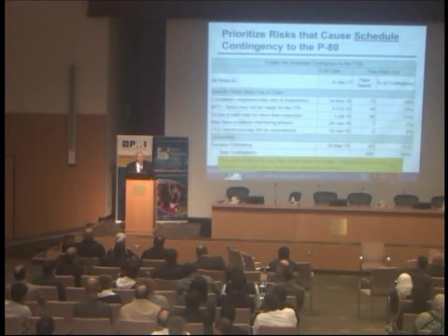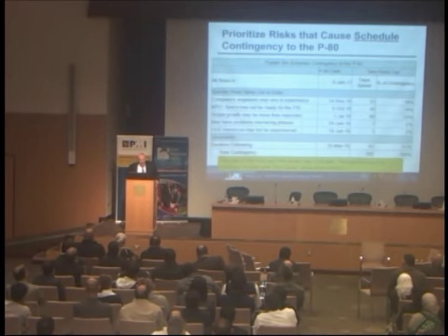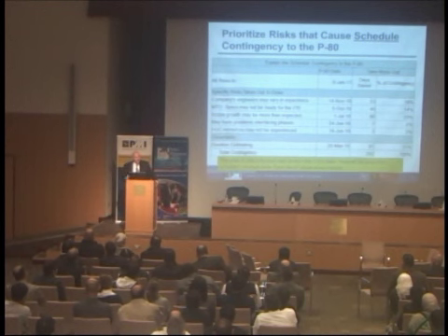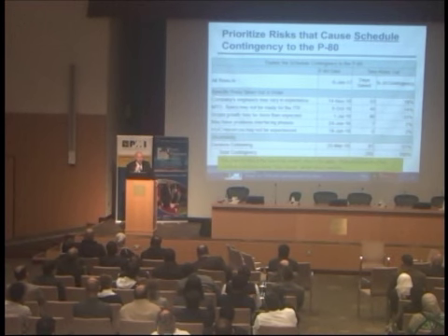And clearing and grading and hauling and stringing, particularly when you realize that we don't have access to all the land yet because some of the landowners are not willing to sell at the price we've offered, which means clearing and grading is going to have to be done piecemeal until we get access to all the land, adding to the cost and adding to claimable cost by the contractor. So I don't care about lump sum anymore. This is different scope, different assumption. Anyway, never mind.